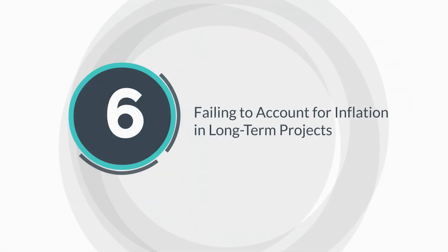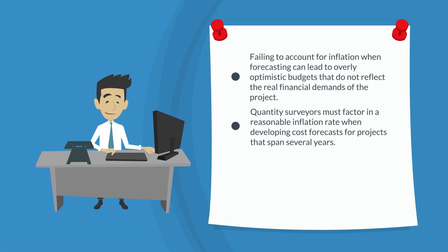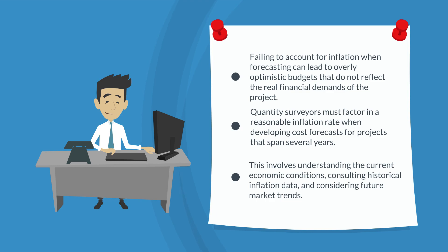Mistake six: failing to account for inflation in long-term projects. In long-term construction projects, inflation can significantly impact costs over time. Failing to account for inflation when forecasting can lead to overly optimistic budgets that do not reflect the real financial demands of the project. As prices for materials, labour, and other resources rise over time, the initial estimates may fall short, resulting in budget overruns and financial strain. Quantity surveyors must factor in a reasonable inflation rate when developing cost forecasts for projects spanning several years. This involves understanding current economic conditions, consulting historical inflation data, and considering future market trends. By incorporating an inflation allowance into the forecast, quantity surveyors can help ensure the project's budget remains realistic and robust throughout its duration.